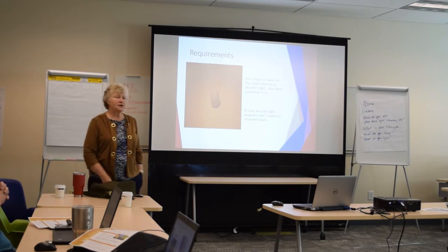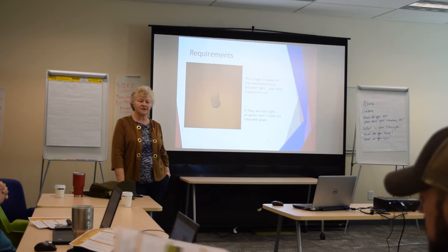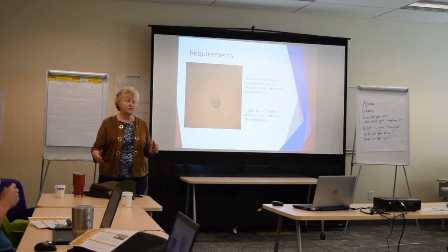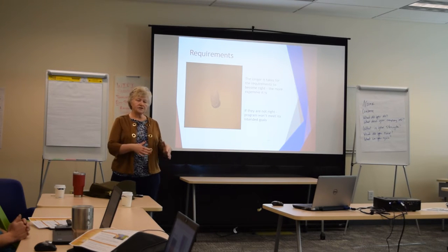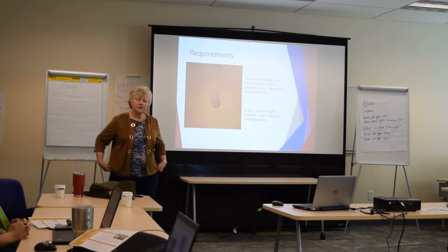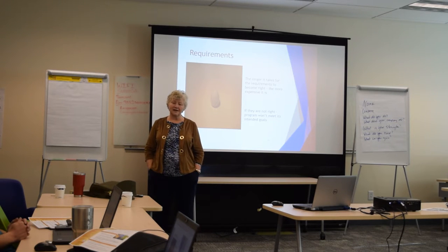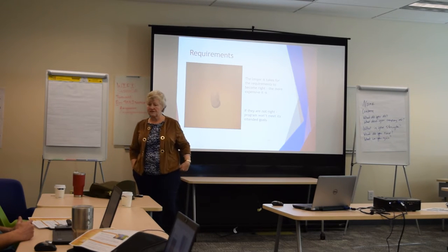Department of Labor, this wasn't my first experience with it. It happened within the last 6 months. Department of Labor put out an RFP, which I didn't see, but it was for somebody to come in. They have the work centers all around the country. All those work centers right now are firm fixed price, and they want to change them to cost reimbursable. I'm sorry. They're cost reimbursable now, which means every hour the contractor works, they get paid for it. They want to change it to firm fixed price because they feel like the requirements are all steadfast now.